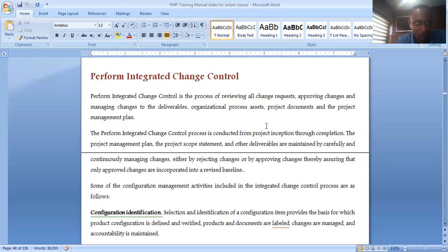What if the windows are not completely installed? What if the doors are? What if analysis in the planning phase, you are probing it? And that part of it that you're doing in the planning is affecting your risk identification, right? That's what you're doing there. So there's no way you will go through this process and not capture that 32 windows that's missing in the planning. And you will even go back and front, the plan, back and front. The civil engineer too is looking at the plan, is looking at the constructability of the architectural plan in the planning phase.